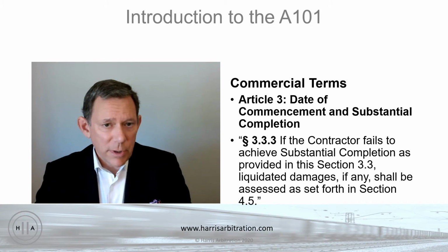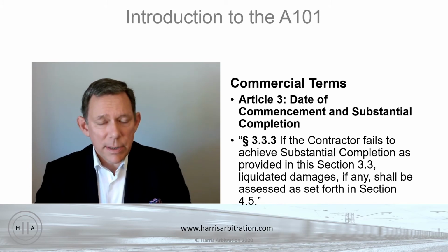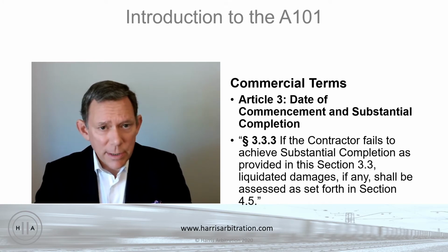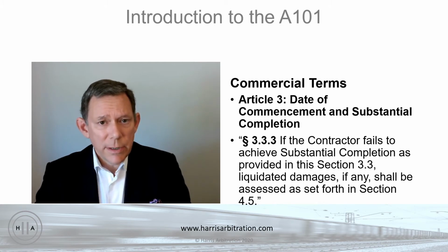In the context of a construction contract, typically the contractor will agree, not happily necessarily, that if they do not achieve substantial completion within the contract time, within the X number of days that the parties have negotiated and plugged into this A101, then the contractor will have to pay as liquidated damages Z number of dollars for each and every day that the contractor fails to achieve substantial completion.